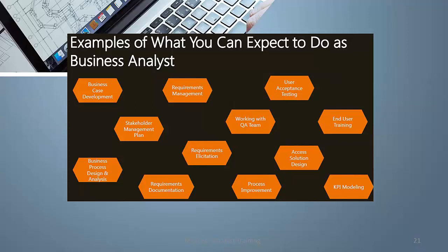So step number one is to find the benefit. You are analyzing it: if I get that software, what are the benefits that I'm going to get? You have to list them down. In a business case, the first step is to list down the benefits: benefit 1, 2, 3, 4, 5. Now, what benefit do I get from a financial perspective? All the 10 benefits that you have listed, you have to convert into financial value, dollar value.